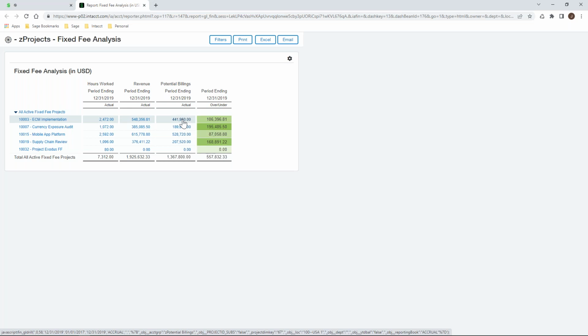It's in the cost accounting or job costing module, or capability, that you get. It's saying if you were to have billed this project out on a T&M basis, time and materials basis, what would this revenue stream look like as opposed to the fixed fee basis that it's based upon? It allows me to do a comparison to see whether or not we're quoting our fixed bid projects the way that we should be quoting them. Now, if this is a huge number, if that's of concern, then maybe we're quoting them too high and maybe we're pricing ourselves out of the market.